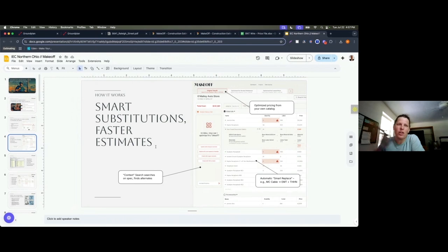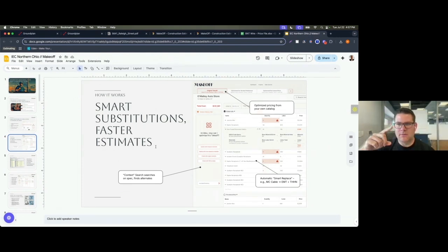I'll look at the hard data of how long it actually took to do it. And then I'll actually take it off in ConEst and see the difference. I've had as high as a 50% difference between ConEst and reality. Wow. Up or down? ConEst was high.